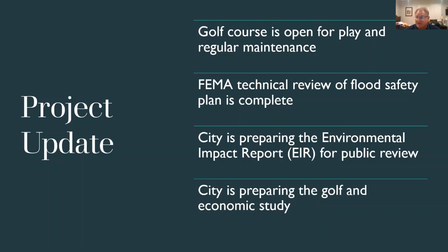If you remember, that's 17 plus sections that have to do with traffic, wildlife. Flooding is part of it. Noise, light, water usage. So all of those things are how the project might impact the local environment. The city is preparing that now, doing minor administrative changes, and hopefully they'll be releasing that in the very near future. Also, the city is preparing a golf and economic study. It's already been completed, both of them, but they're doing the administrative changes, and hopefully they'll release those at the same time they release the environmental impact report.